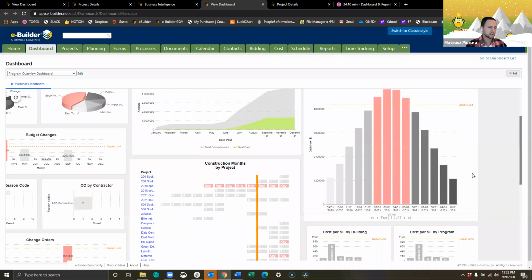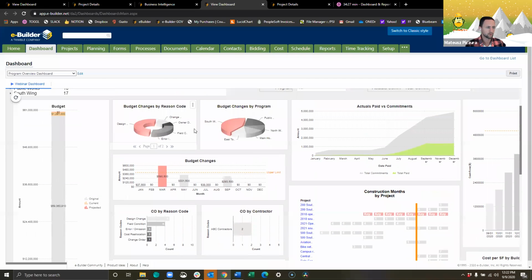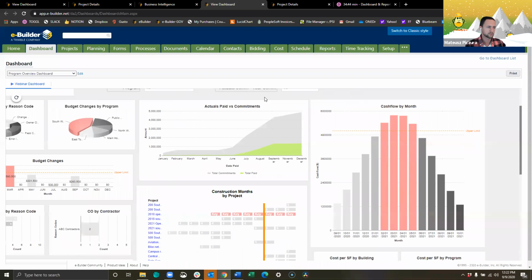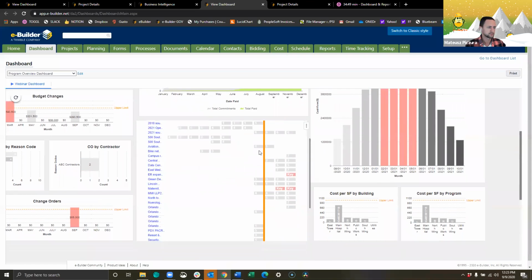So you can take two paths here to resolve it, right? One, you can shift your project schedules, so that curve gets flattened out a little bit more. Or two, you can affect your budget and funnel more money overall to the program, and then increase that curve. And at the same time, you can make that decision here by looking at how much overage you currently have and whether you can take on more overage to cover that cash flow, or you can take the second path, which is essentially looking at your schedule. And that is this visual here.